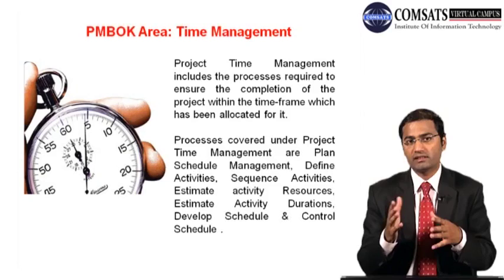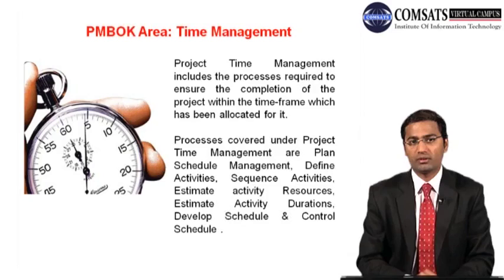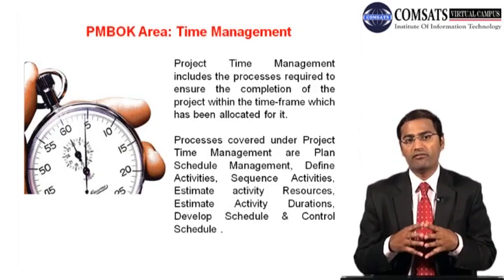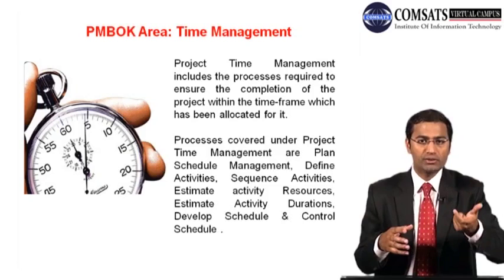Like if one mason works 1 day or 8 hours and places 1200 bricks, how many masons will be needed if the number of bricks to be placed is 3600? Ek mistri 1200 inte lagata hai ek din mein. To agar humne 3600 inte lagani hai to hume kitne mistri chahiye?